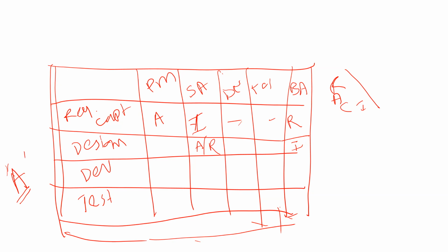There could be multiple responsible. For example, in development, the developer will be accountable as well as responsible. The tester also might be actually working in developing the thing, and so might the solution architect. So multiple R is not a crime. Multiple A is a problem. You will not be doing it there.